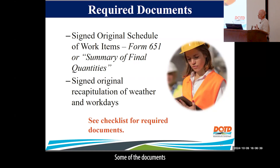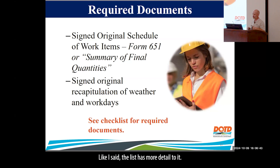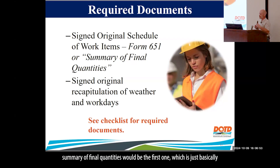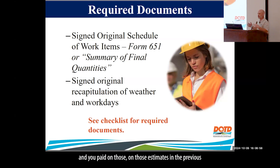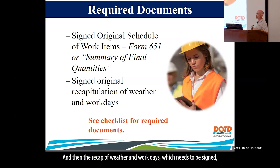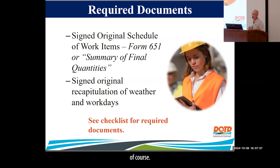Some of the documents that are required: the Summary of Final Quantities is basically a summation of everything paid on all previous estimates, generated when you do the final estimate. The Recap of Weather and Workdays also needs to be signed — it's generated when the final is generated.